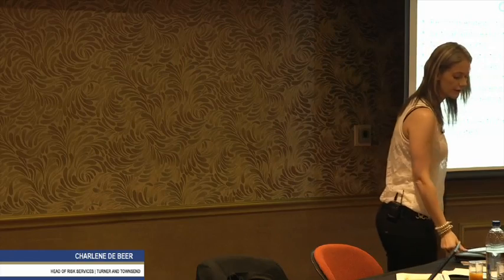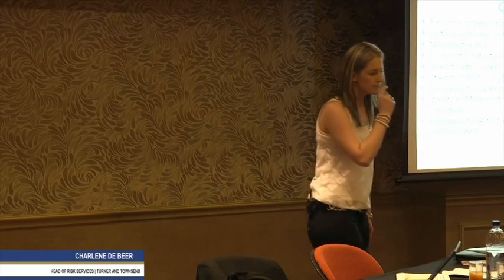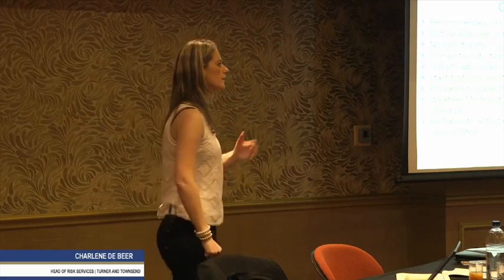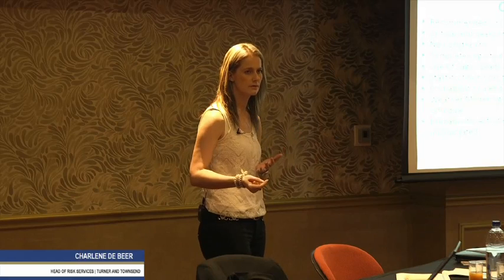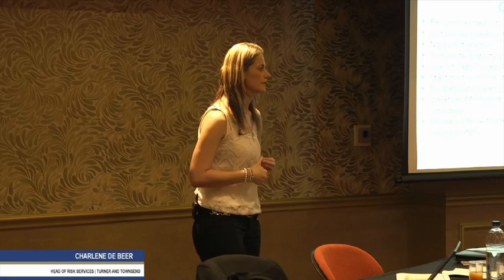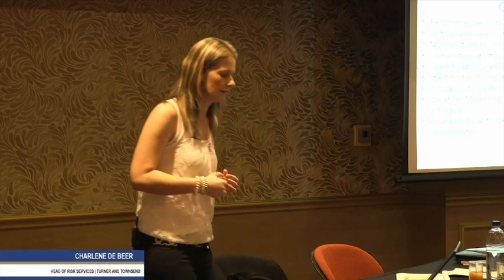What that means is don't double dip. So if the contractor contractually has the right to provide for 1.5 days inclement weather a month, then you must take that into account in your risk. So either in your risk session you said, well, we're going to overrun schedule with 2 weeks, ask: does 2 weeks take into account 10 days of weather already, or is it an additional 14 days or 2 weeks?